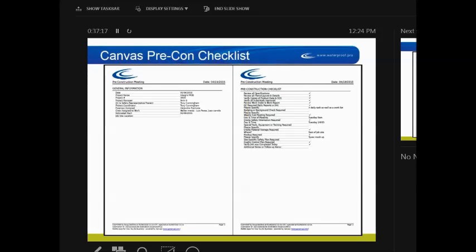Daily reports. Almost every job site requires a daily report, and a lot of them are now requiring a daily JHA, so make sure that we ask that question at the pre-con. You can do your internal pre-con and fill this out after you meet with a customer, but don't leave it blank.